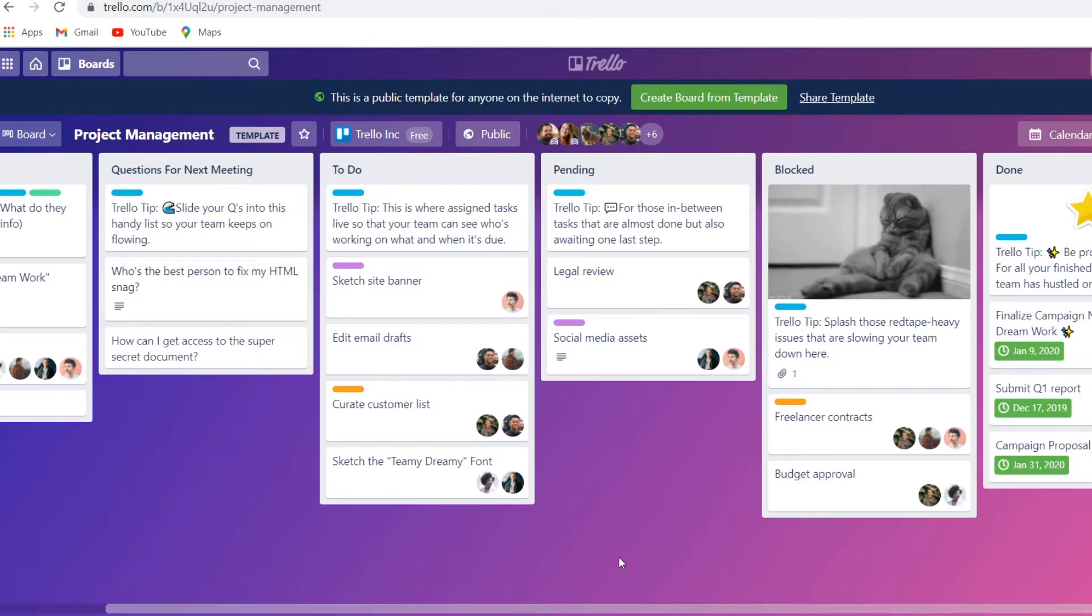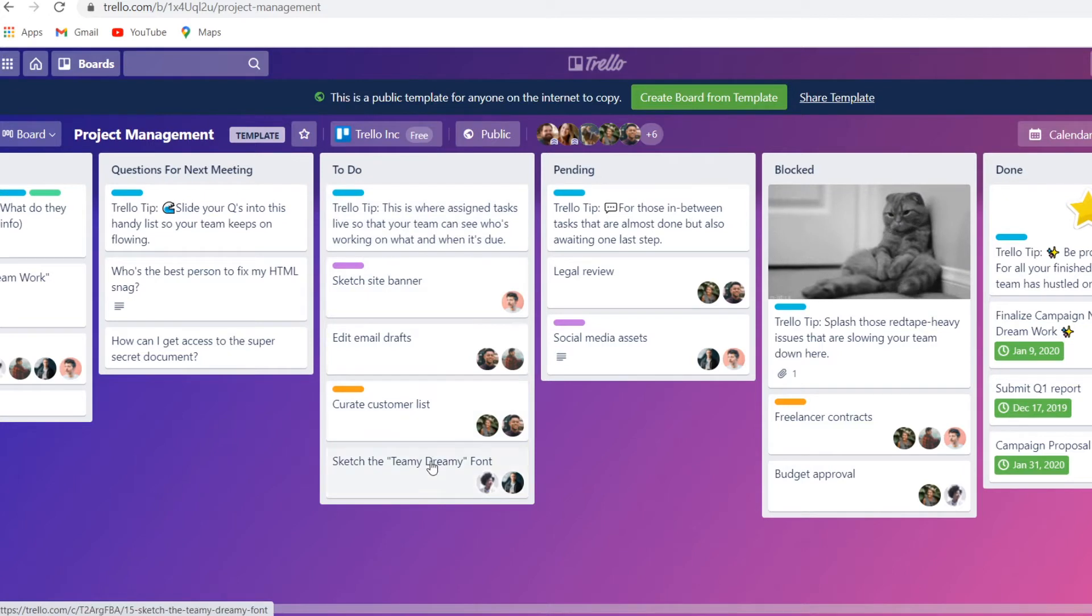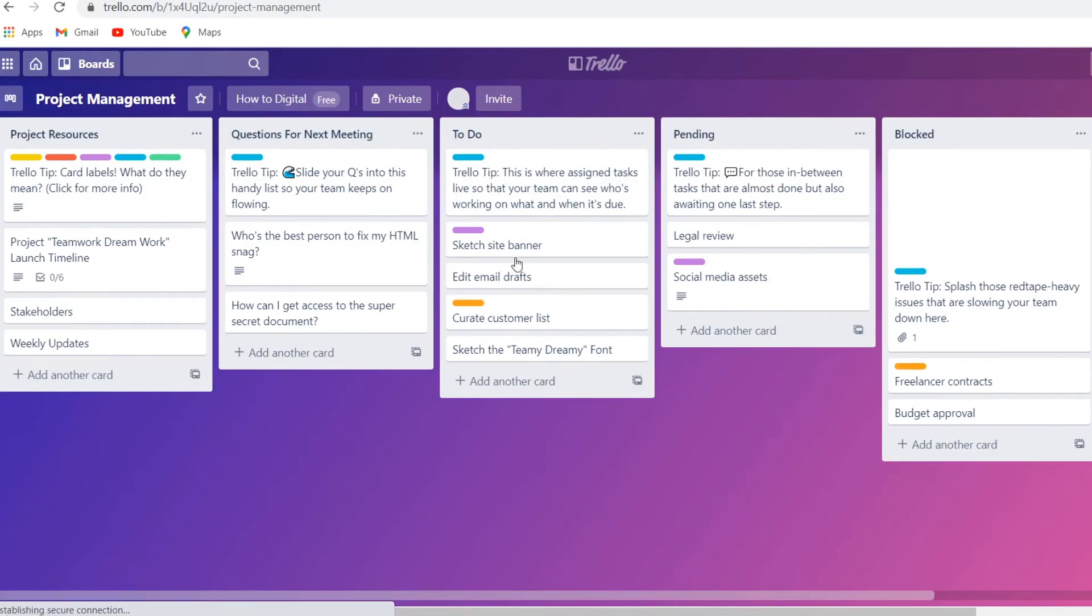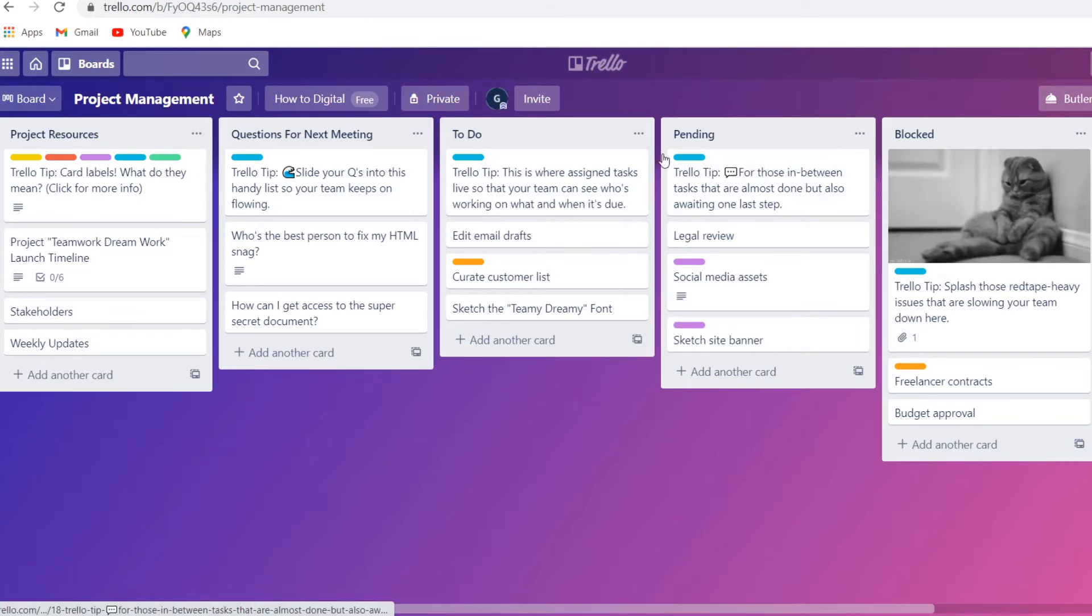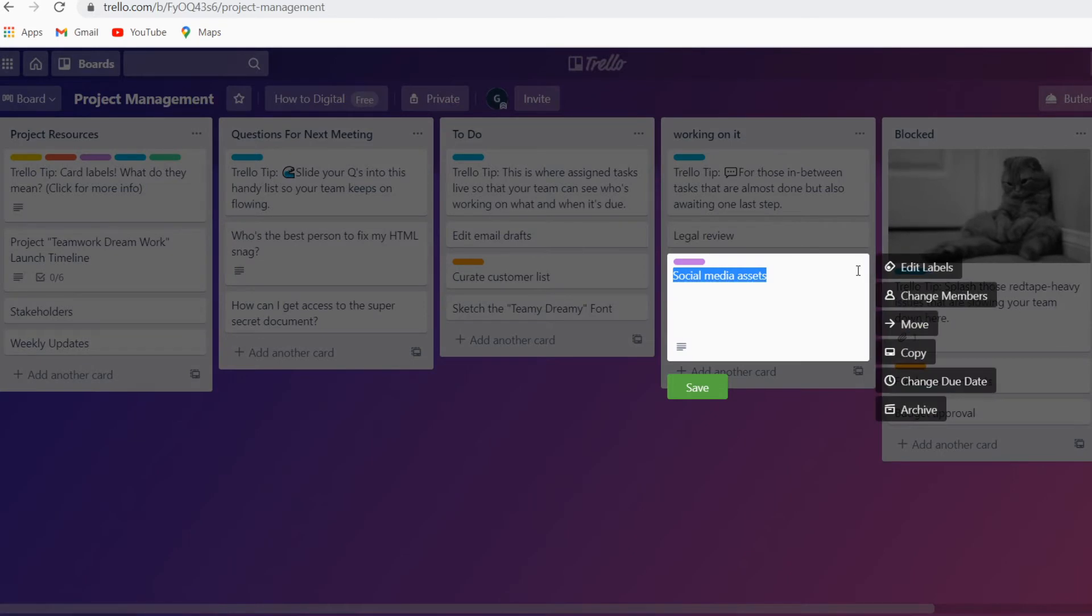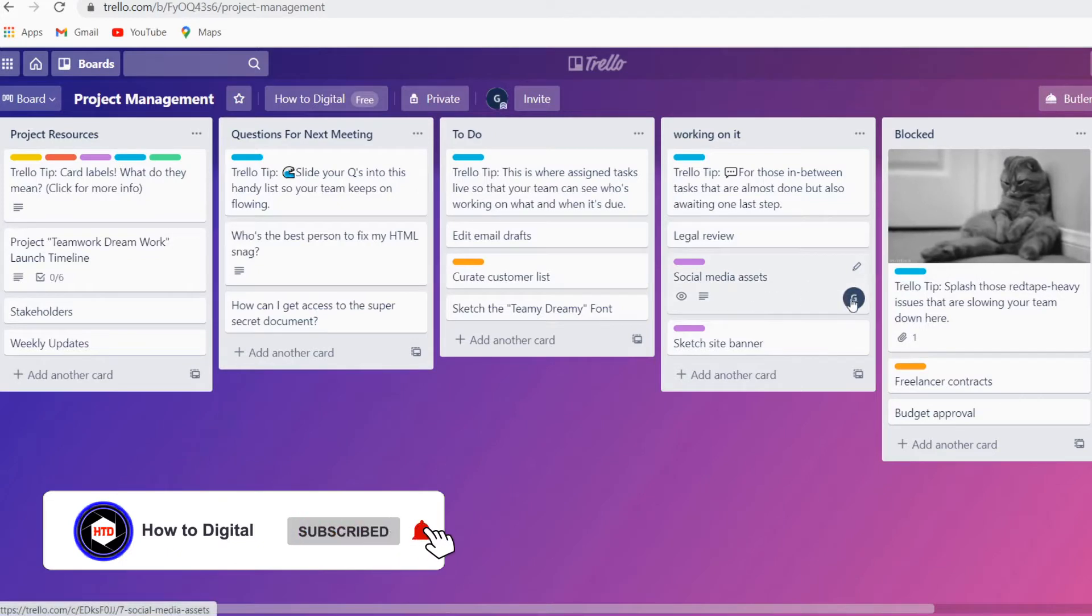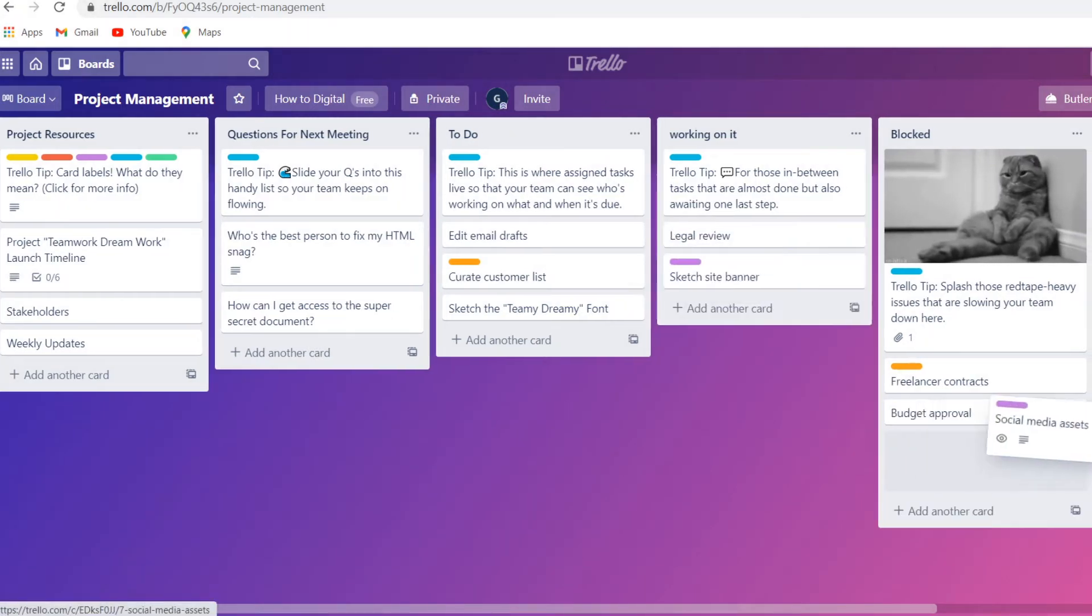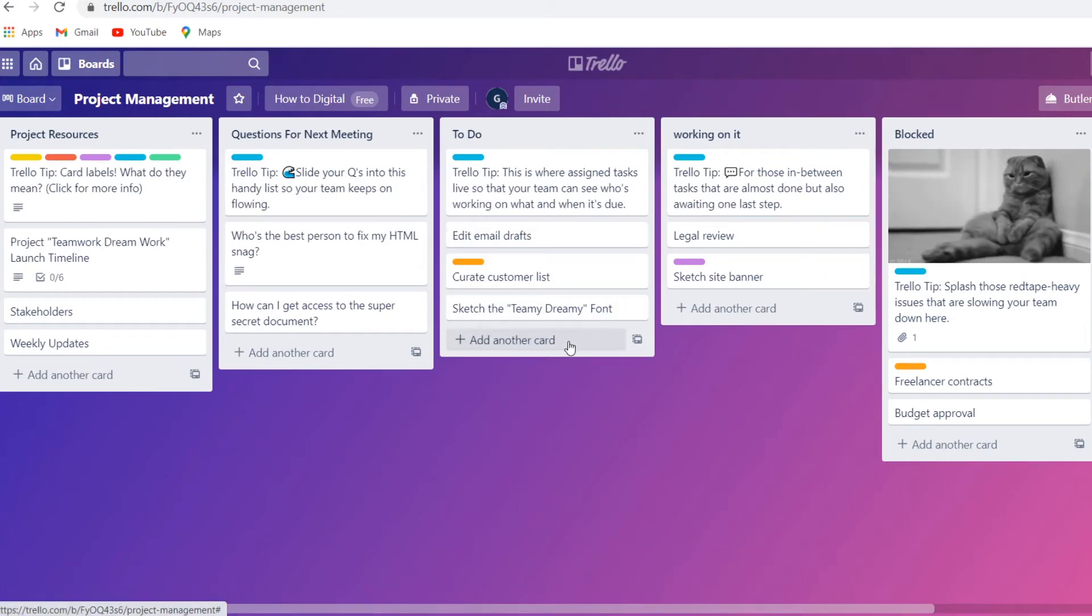This is a similar workflow that I use for my own business. What we normally do is we've got a to-do list, we've got a working on it list, and then we've got a done list. I'll write down all things that we need to do in a specific week. I'll add that in here and my team will then start working on it. What they will do is grab this card and then slide that over to working on it. You can also change that to working on it. Then I know that that person is working on it. What that person will also do is click on change members and add himself to this specific card so that I can see who's working on it. This is great if you're managing a team. Once they're done, they'll slide it over here to done.